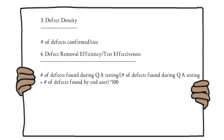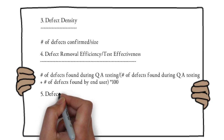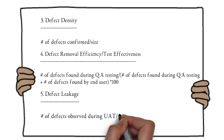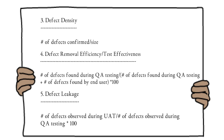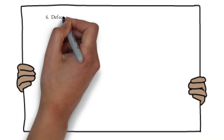The formula for defect removal efficiency is: (number of defects found during QA testing / total defects) × 100. The next metric is defect leakage, which helps find the number of defects that leaked to the next phase — for example, from system/integration testing into UAT testing. This metric helps understand how many defects slipped through to the next phase.